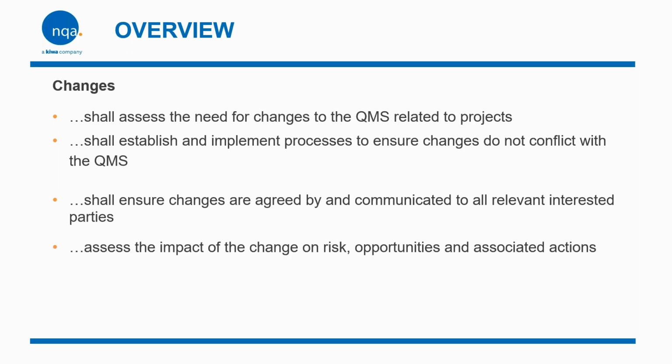So, changes. The organization shall assess the need to change the QMS related to projects. During any construction project, changes will arise due to contractual updates and shifts in project scope, budget, and timeline. So they're asking you to make sure that you assess these. Shall establish and implement processes to ensure change does not conflict with the QMS. So any proposed changes need to be evaluated to ensure that there's no conflict.